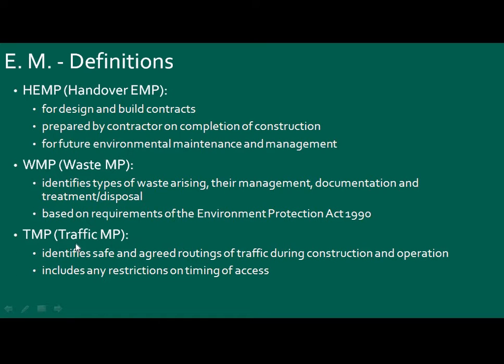TMP, traffic management plan, identifies safe and agreed routing of traffic during construction operation. While construction operations are going on, there is movement by traffic. What is safe routing? That is also part of the traffic management plan. It includes any restriction on timing and access, what time we come, what time we don't go, which vehicles, which routes, all things will be provided there. So there are different types of management plans.